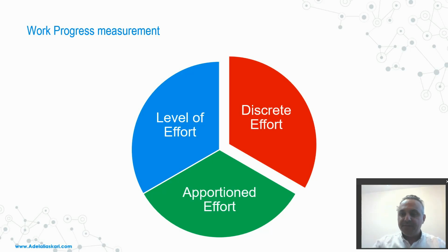For example, if the implementation progress is 25%, then the testing of the implementation is a ratio or share of the 25%. Other examples are managed in the same way, and you have to estimate them based on the progress of each supportive discrete work.